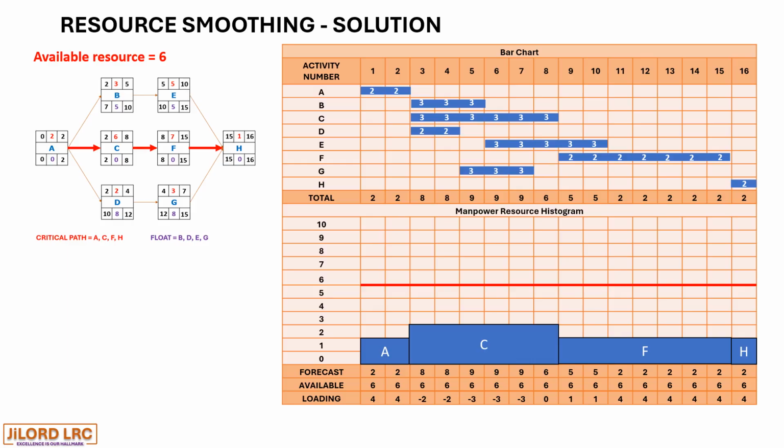Now we can draw activities that are on the float and activities that can be moved at any time. So let's commence with B. So adding B with 3 makes it up to the 6th mark. But we have activity D also on B within the same day. So we have activity D that has also moved 2 points further to 8.